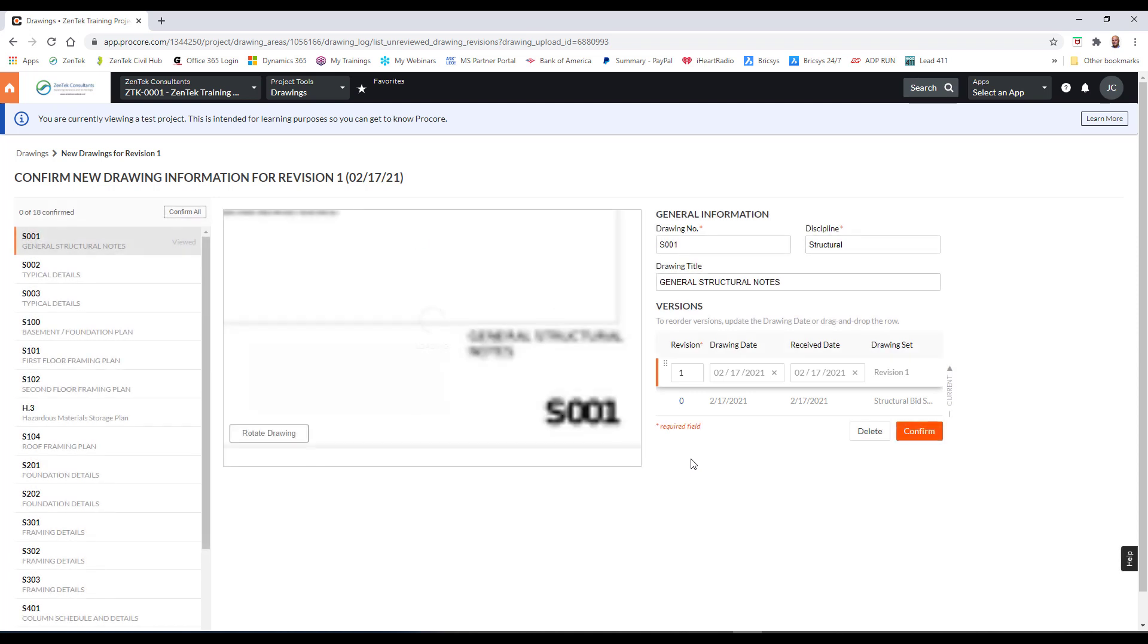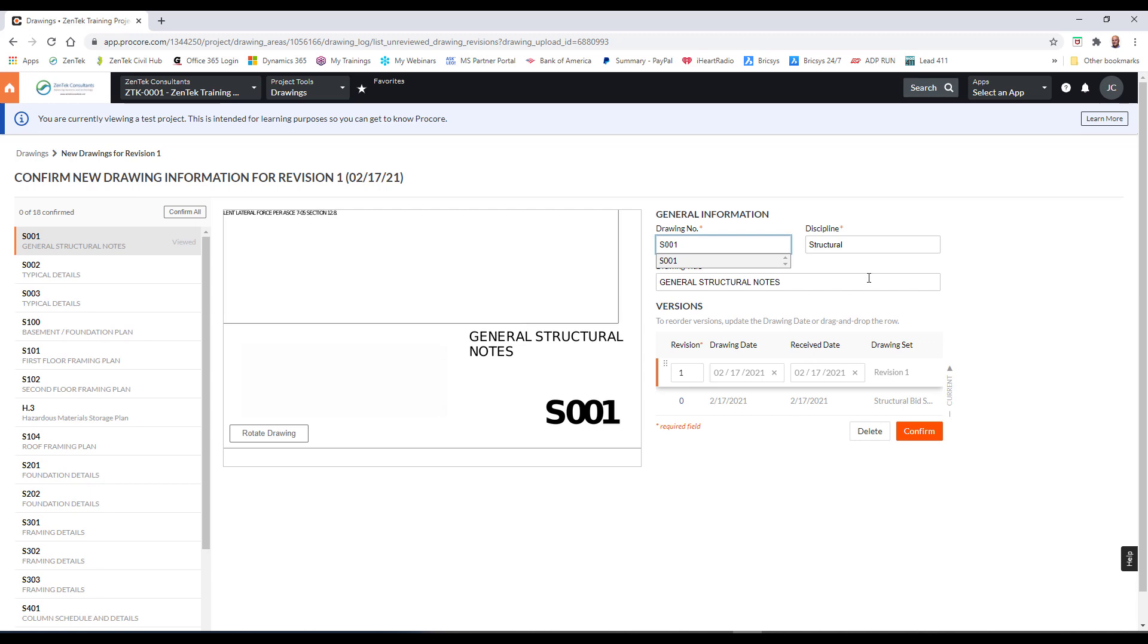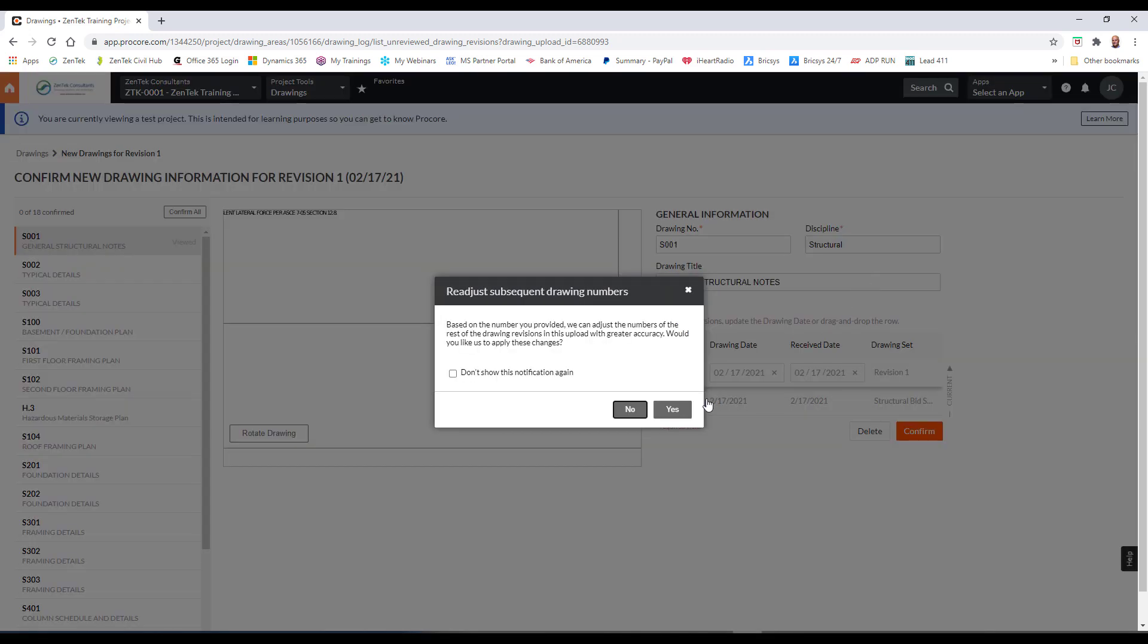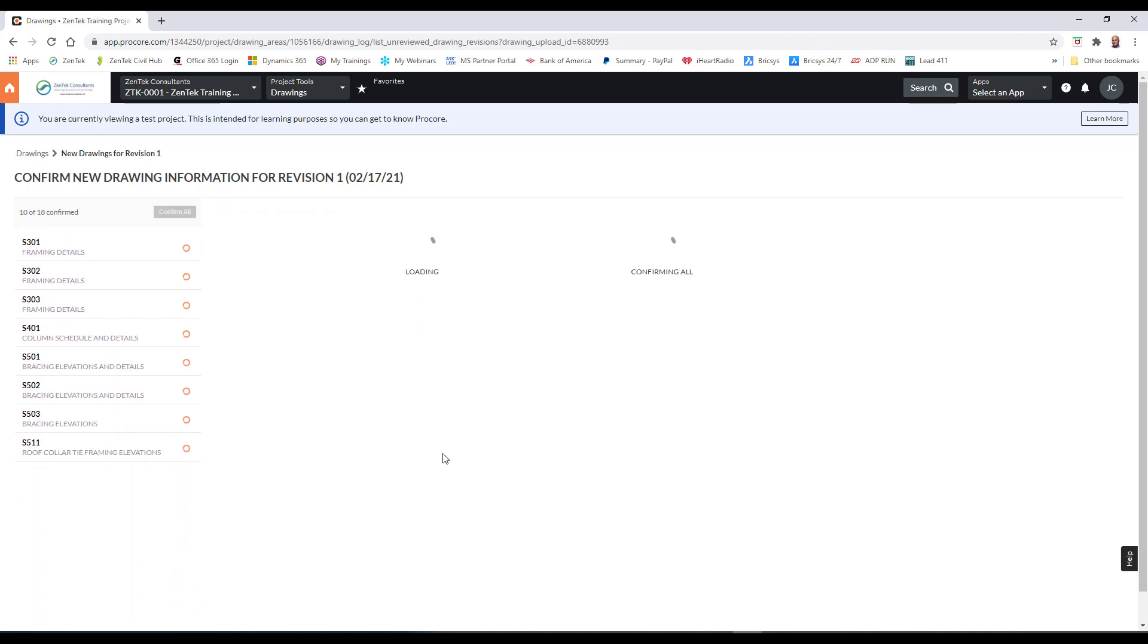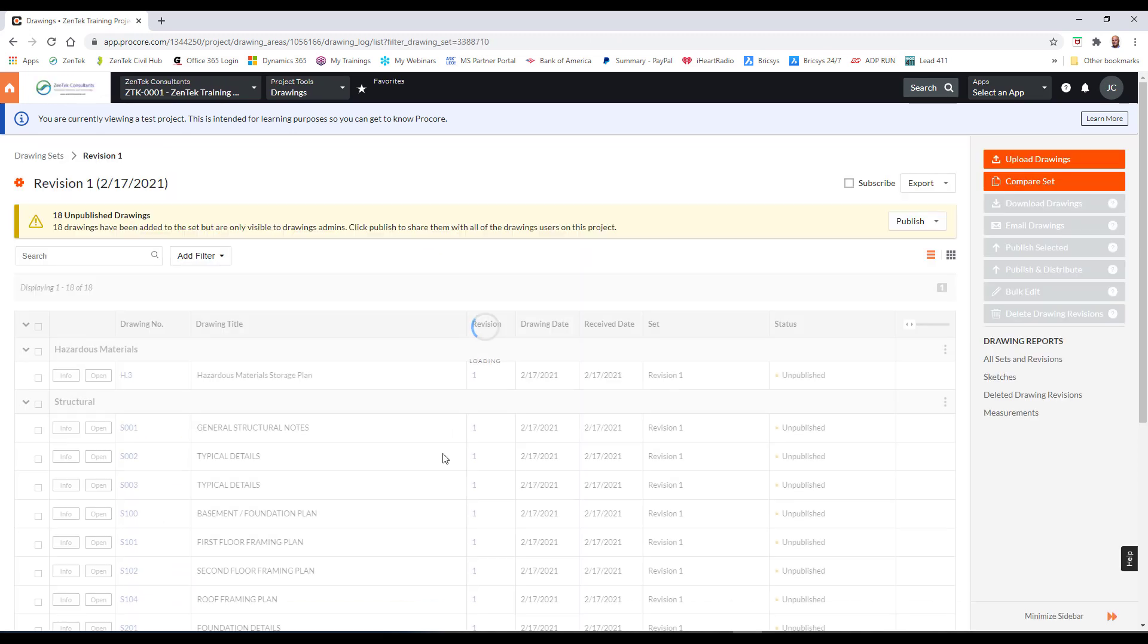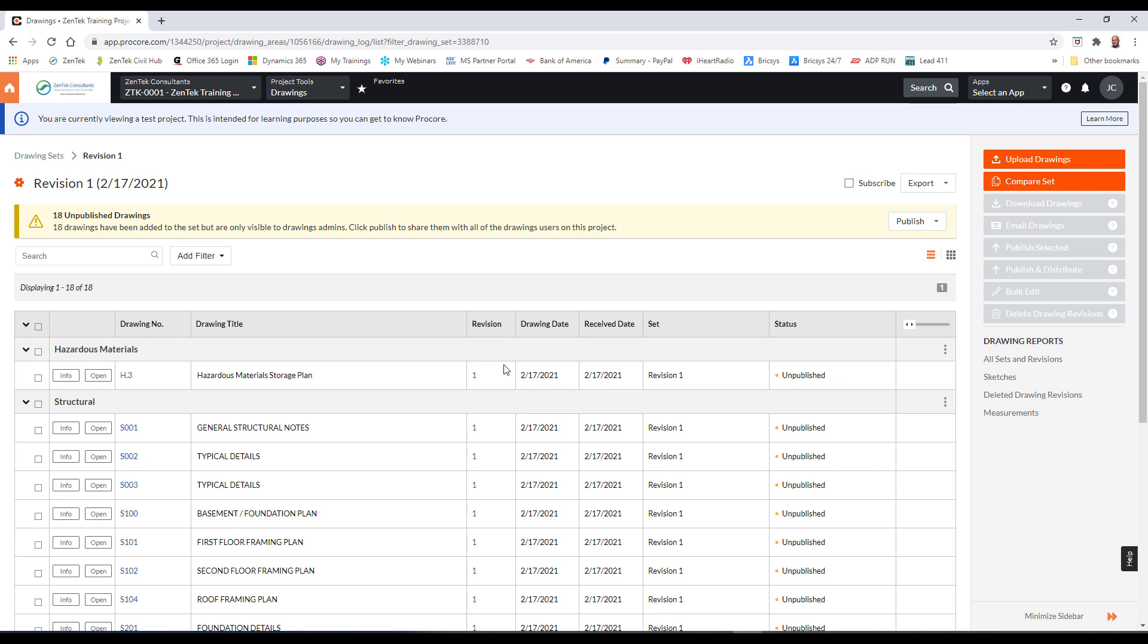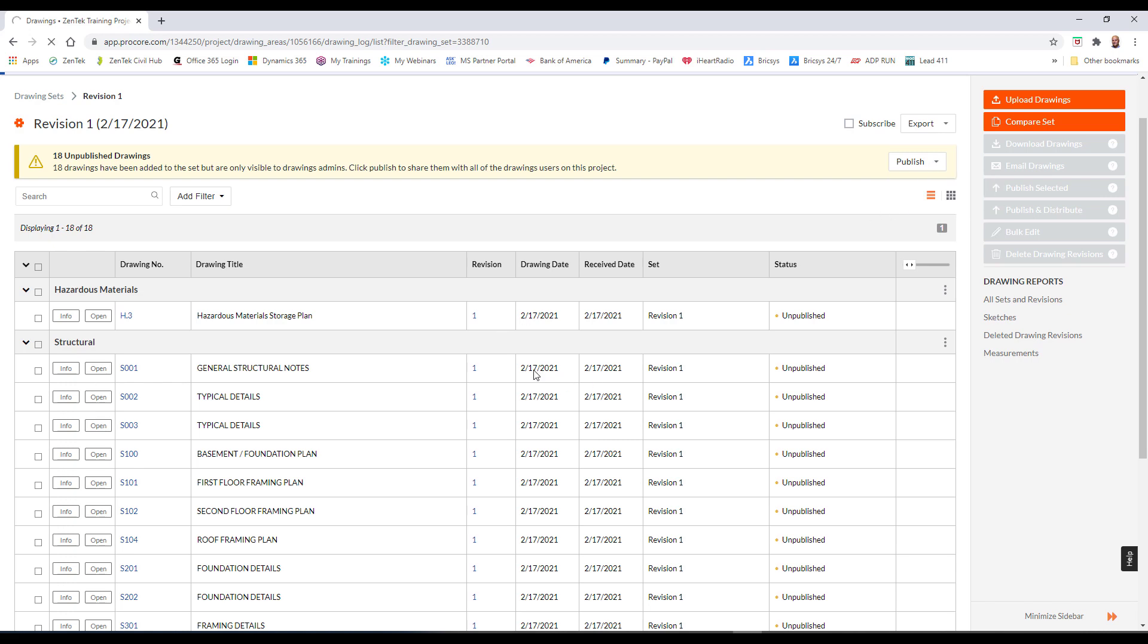And what this will let me do is actually go through and see that I can check each individual drawing for name and number to make sure everything is good. I'm just going to go ahead and, and if I needed to, by the way, if anything was completely wrong, I can overtype those. So, I'm just going to go ahead and confirm all and say those are all good, and let it go through and process. And now you can see that all of my documents have been bumped to revision one. All the documents are there. Everything's been updated and set. Now all I have to do is just go ahead and publish all those so that everybody in the project has access to them.